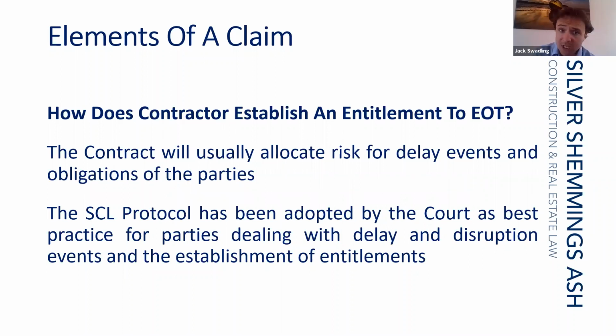How does the contractor establish an entitlement to an extension of time? As mentioned, the extension of time provisions allocate the risk of delay events between the parties. I would thoroughly recommend anyone facing these sorts of issues give the SCL Protocol, which you'll be able to find on the SCL's website, a look, as it provides thorough guidance on best practice in presenting an extension of time claim. It's a long and detailed document, but it's been accepted by the courts as a guide to best practice.